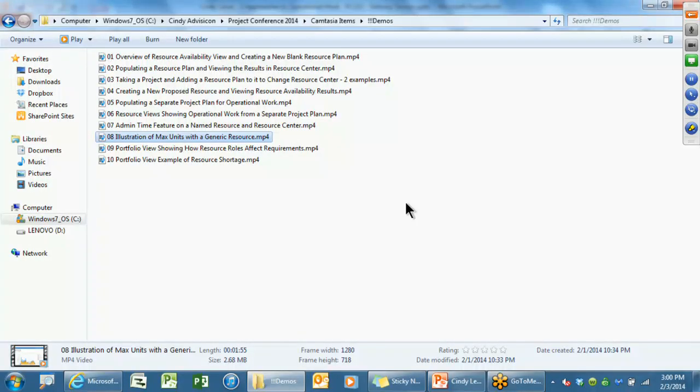We've got questions in the very back. Yes, go ahead. So my question is on max units. If an admin changes the max units on a resource that is assigned on active schedules, will that dynamically impact those other schedules? Yeah, so if they change it from, let's say, 100 to 500, what happens? It affects the capacity line, is basically all that it really triggers. So those resources that might have been over-allocated at 100 are no longer over-allocated if you bump them to 200 or 300. It only impacts when you assign a resource going forward. If you change it from 100% to 200%, that'll be the default if you don't put it in as you hit enter. That's a good point. Yep, it does affect the future.